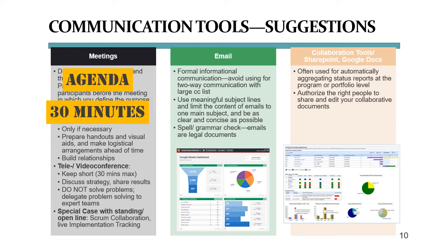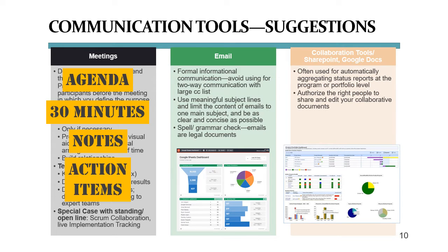My third rule is make sure someone takes notes and circulates those after the meeting to ensure everybody knows what was discussed and decided and who was there to discuss and decide. And the fourth important rule of meetings is nobody gets to walk out of a meeting without an action item, meaning a task to do in support of what was just discussed.